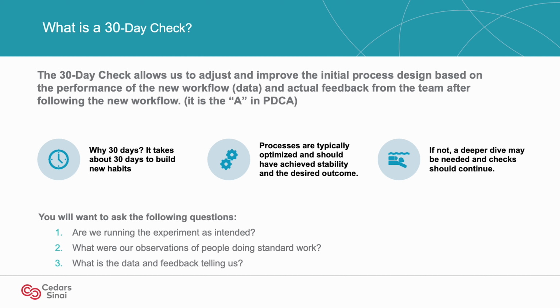With that said, the 30-day check is not set in stone. Teams can adjust the timing of the check to be sooner or spread out based on the implementation and the needs of the project. Also, issues of patient or team safety should be addressed immediately. Be sure to discuss it with your leader on what would be the best cadence for your particular project. Overall, it is critical that you have an effective 30-day check. Let's go through the details and how to prepare for these meetings.